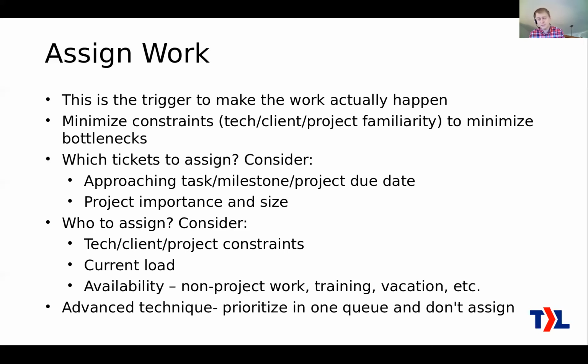Basically anybody in your team can take any ticket because you've put a lot of effort into making sure that everybody's trained up, not just in certain technologies, but in different clients as well. Everybody's familiar with every client. So if you've done that sort of work to minimize those constraints, then you can do this technique and just make one queue of work. And then the engineers, when they're ready for new work, just go to that one queue and take whatever's on the top. That can save you a lot of work in the long run by not having to do this estimation.